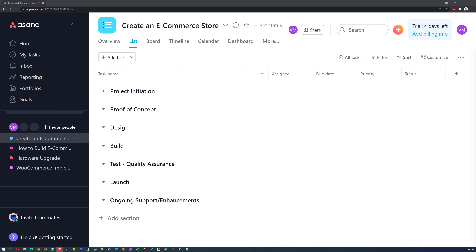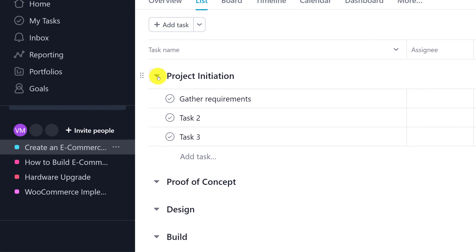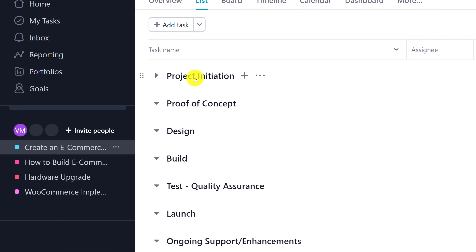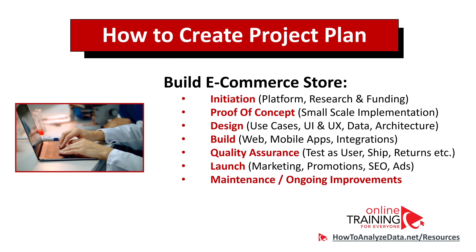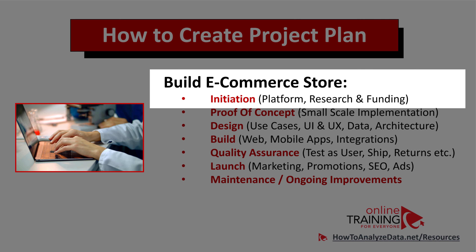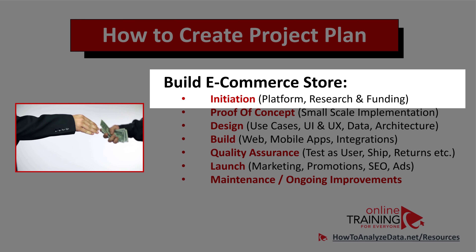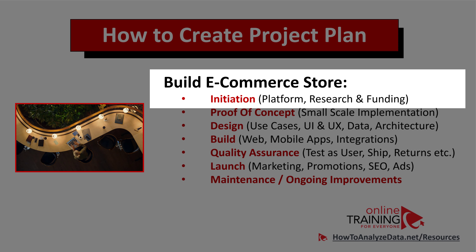Now let's take a look at how to create an effective e-commerce project plan in Asana. One of the best ways to organize a project in Asana is by creating project milestones and putting tasks under each milestone. In this project, there are seven milestones: project initiation, proof of concept, design, build, test for quality assurance, launch of the website, and ongoing support and enhancements. Different activities are typically performed in different phases. For example, as part of the initiation phase, you typically research the platform and make sure you secure the funding to run the entire project. You also need to decide what skills are needed and where to find the right team members.